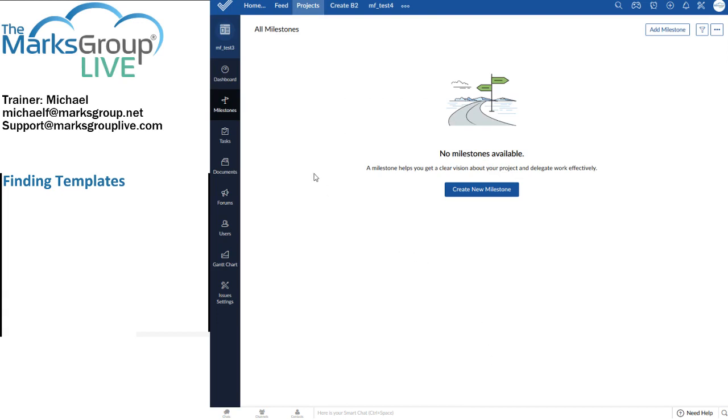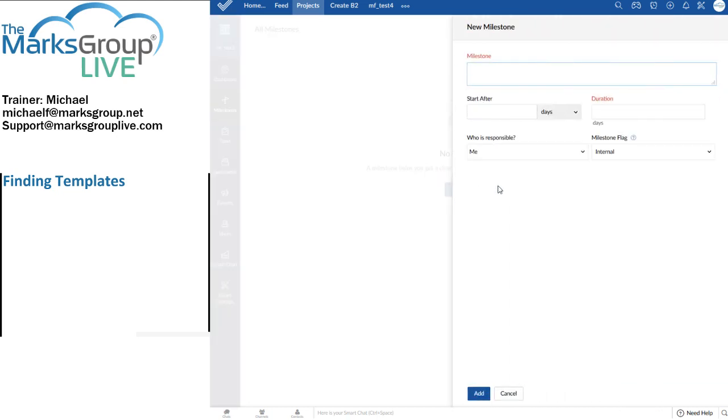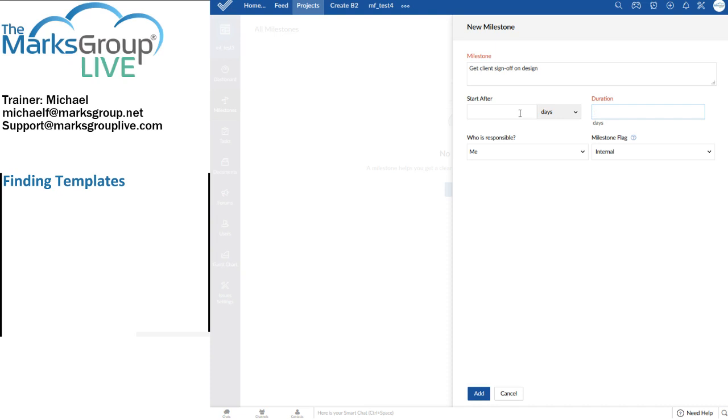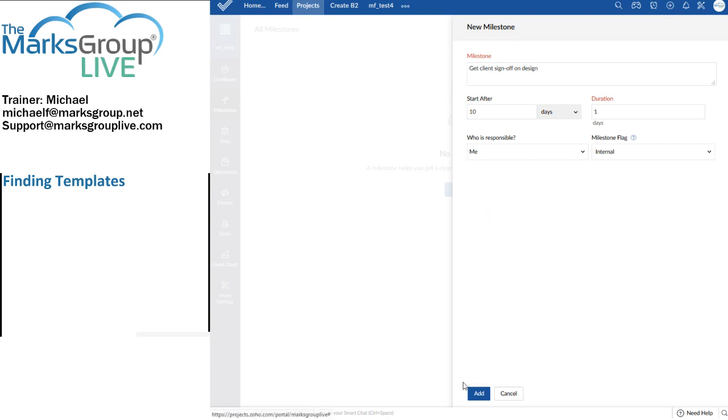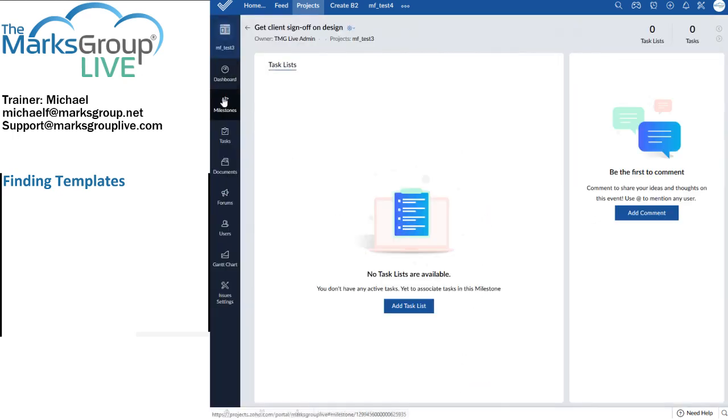So now, I'm in the project template for MF Test 3. And I can create new milestones. So I'm given the option to do so here. Get client sign off on design. And the duration will be one day. And we'll start that after 10 days. I'll set myself as the person responsible. So now, I have a milestone.